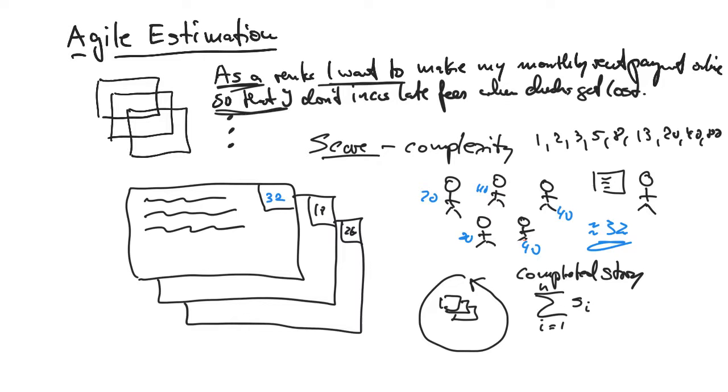So let's say you got one story done that had 9 points, one had 4 points, one had 11 points worth of complexity, one had 22 points. You add them all up. So you got 20, 42, 46. You got 46. And again, I'm assuming math is correct here. It's 9 plus 4 plus 11 plus 22. So you have 46 points of work that you've gotten done.